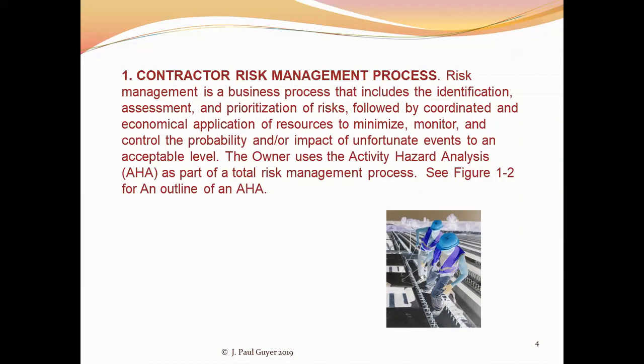So a numerical approach like this can be helpful in visualizing the priorities, but these numerical approaches can sometimes create a false sense of security: well, this is a 7 and this is an 8, so clearly I don't need to pay any attention to the 7s.